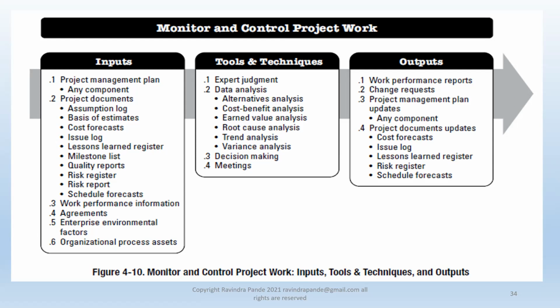Then issue log. Similarly, any additional issues pop up whenever you start work. Like they say you need to fix the biometric near the door, which is basically the concrete column. You can't normally drill into that column because it affects structural integrity. So you might need to use some adhesive paste or something like that, or find a way and means of attaching it to that wall. Again, this has to be understood, discussed, and then resolved.